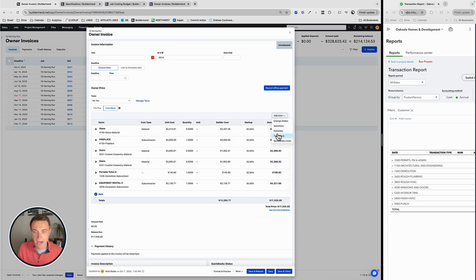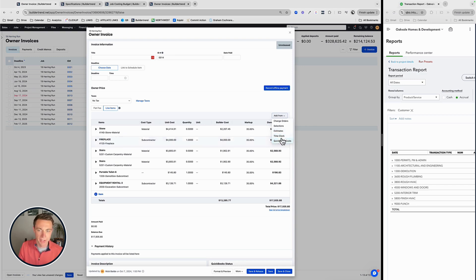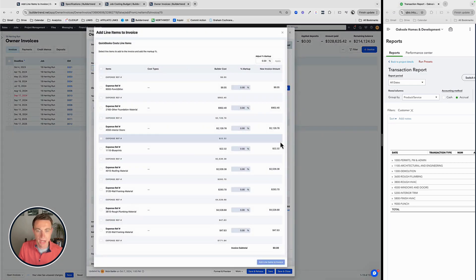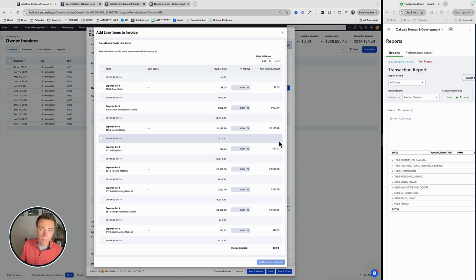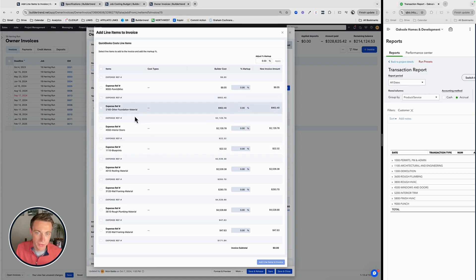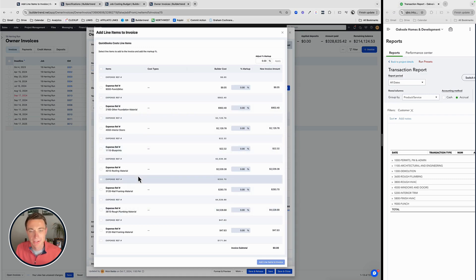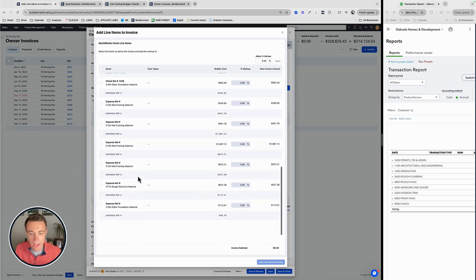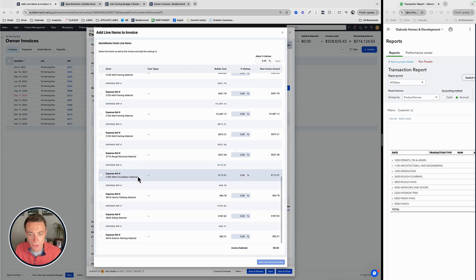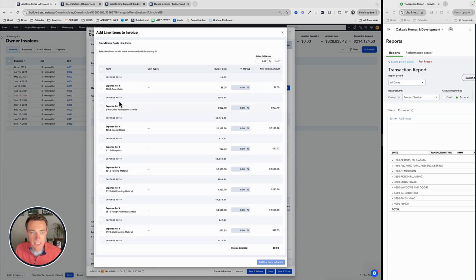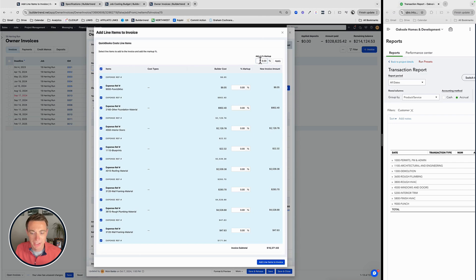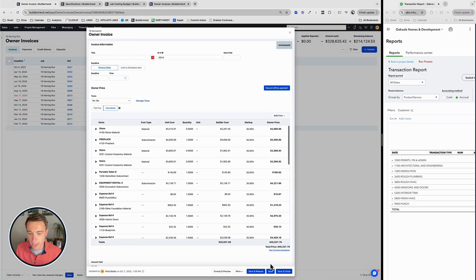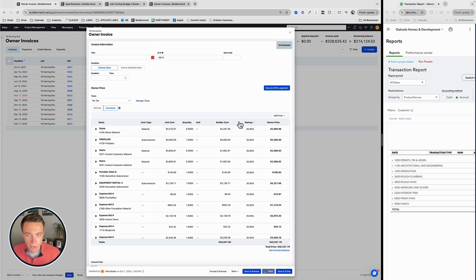Notice that I've added all my bills. It's now gone from my list. There's none. There's no additional bills to add here. So there's nothing else to do there. Next, what I'm going to do is QuickBooks costs. These are costs that come directly in from QuickBooks. We want to link up with QuickBooks and we want to link to project and to cost code. So these are expenses that come through for whatever reason we decide to use them within QuickBooks, as opposed to within BT itself. And again, because of my 35% standard markup, I'm going to select all of these. I'm going to do a 35% apply that there's my $22,000 total. I'm going to add those line items to the invoice. And again, well on my way to a really strong invoice.